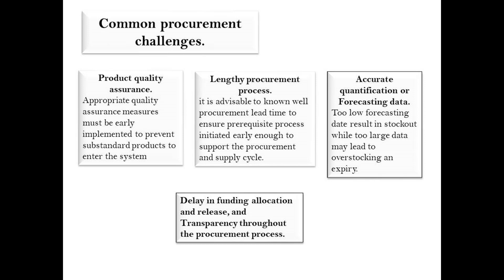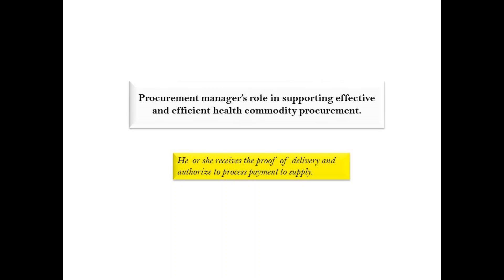Additional challenges include delay in funding allocation and release, and lack of transparency throughout the procurement process. The Procurement Manager's role in supporting effective and efficient health commodity procurement includes receiving proof of delivery and being authorized to process payment to the supplier.